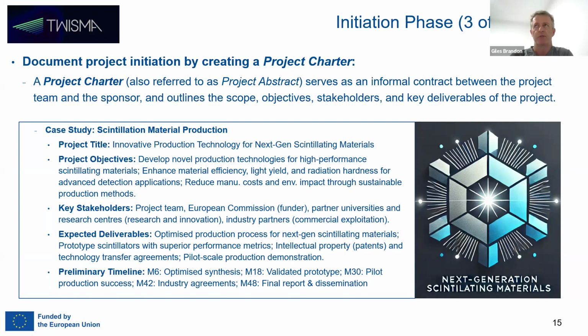So if you're at this very initial stage and you're trying to get a proposal concept off the ground, and you're probably going to be involving unique consortium partners, it's very helpful if someone can produce a project charter or a project abstract. Essentially a document that's maybe 1 or 2 sides of A4, and it's something that can be shared with potential partners for the project proposal to capture their interests, to act as initial talking points, and so forth.